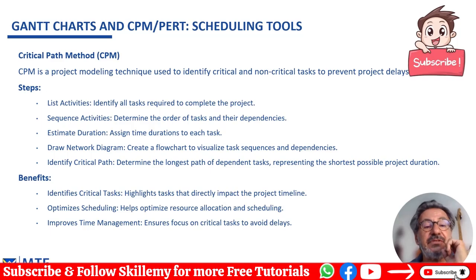Critical path method. So, as we said before, it's a project modeling technique that is used to identify critical and non-critical tasks. It has the following steps. First, you need to list the activities. Then, you need to sequence the activities, which are precedent, which are continuing, which are dependent on each other. Then, estimate the duration of each task. Draw the network diagram, that means creating a flowchart to visualize sequences and dependencies, and then identify the critical path,